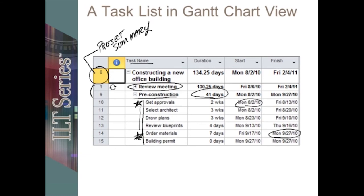Any column you see can be filtered, reordered, added, or removed without affecting the data inside. Last but not least, we have our indicator column. This is where you see all the messages of things that you might want to know about, whether it's an over-allocated resource or a note that someone has added.